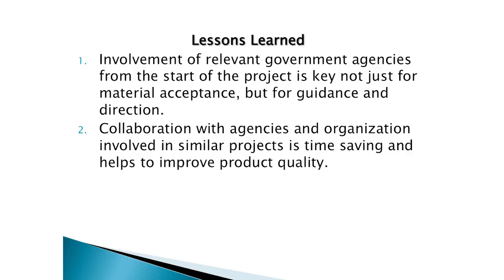We also realized that collaboration with agencies and organizations involved in similar projects saves time and improves your product, because there will be no need for you to reinvent something that is already in existence. And that was why we thought we didn't have to do too much work on coming up with the phonics scope and sequence. We just used what was available that is being used by NEI Plus.